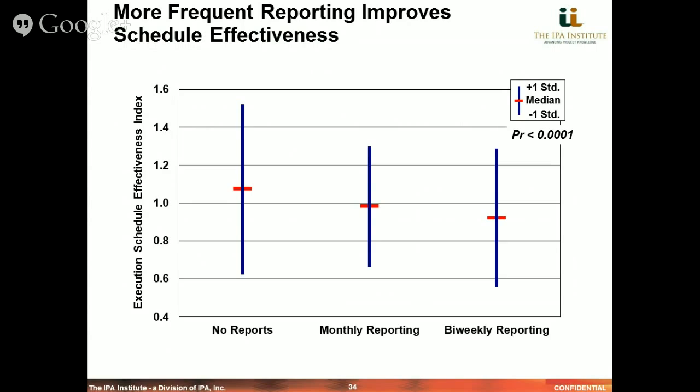But what I want to emphasize is, we're not talking about the glossy, pictured monthly reports that may go up for public consumption or to the top management. These reports are downloads of the project data compiled into a useful, data-rich format that are then available to the project management and leadership for quantifying where the project is, where the variances are, and what has changed since the last status update. So it's the level of detail, the amount of information, and the frequency that these are made available.